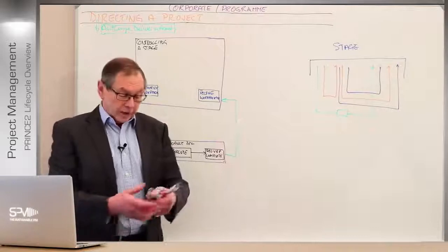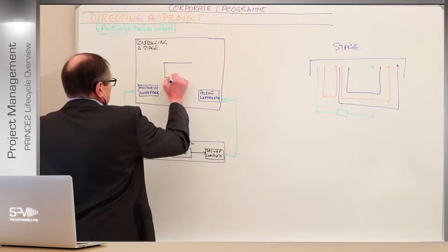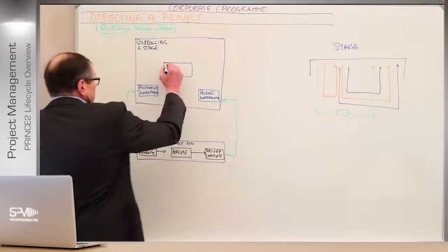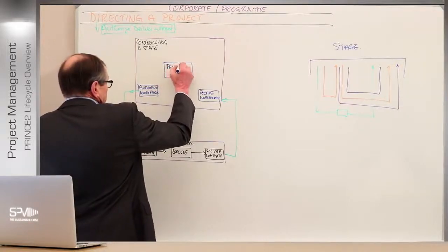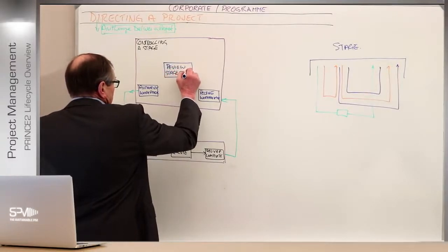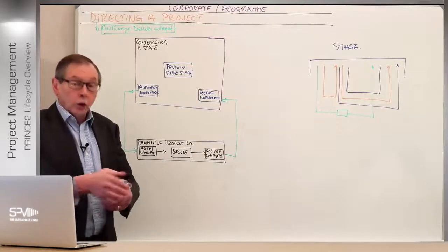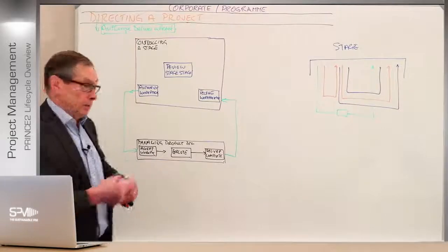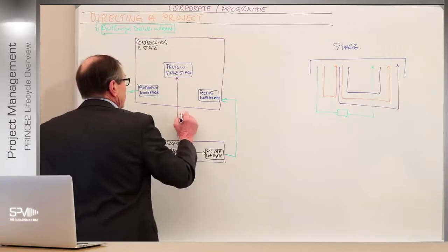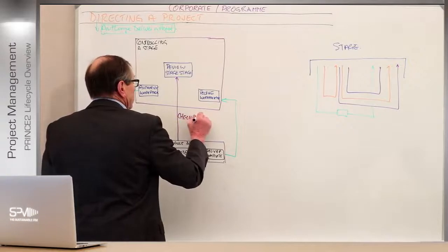Now, other things happen within that stage. So, the first functionality that goes on here is for the PM to monitor and keep control on the stage, right? So, review stage status. Where are we at any one point in time with the stage itself? And that's done in various formats. The first one, of course, is to look at how the build's getting on. So during managing product delivery, there will be a feed in here with the checkpoint reports.